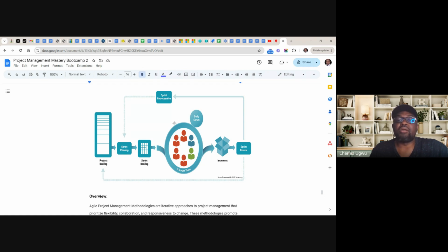So all these applications we use, this is how most of them are being developed. And within that period of time called sprint, mostly a period of 1 week to 4 weeks, the team has to work to deliver an increment. An increment means that at the end of every sprint, there must be a value delivered to the stakeholders.